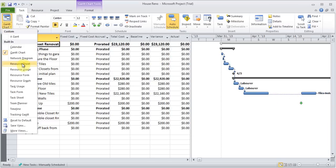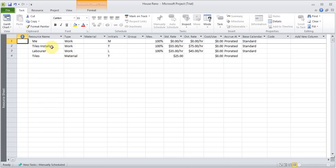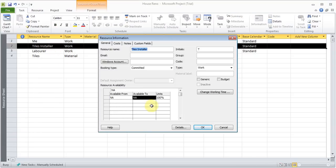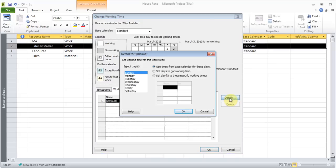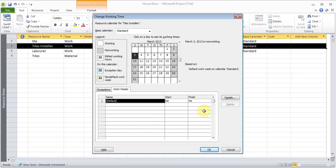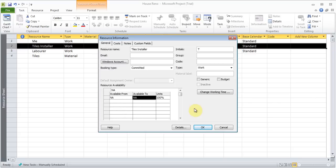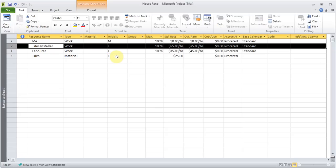Come back to resource sheet. Double click on the tiles installer. Change working time. I can delete that. And you can even change his work week time. You know. For example. He was going to be working on Saturdays. You can set that. So this guy will be working on a Saturday. So I can set to a specific working time. For a Saturday. So he'll be working. So that would be a way to work with your deadlines. You know. But you can get somebody to work extra. Or you can start adding. You can start adding more laborers. So that would be another way of working with it. So then he'll get paid for the overtime hours. And things like that. And you can add 200% of laborers. Wherever you needed it.